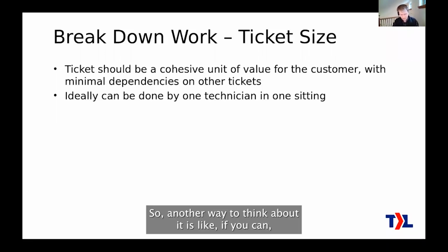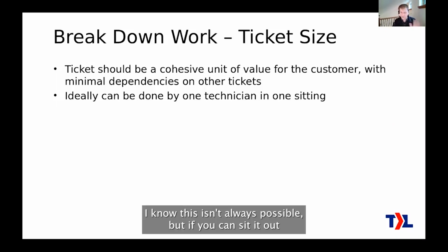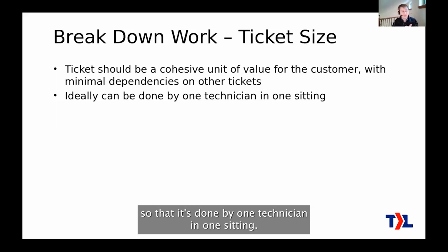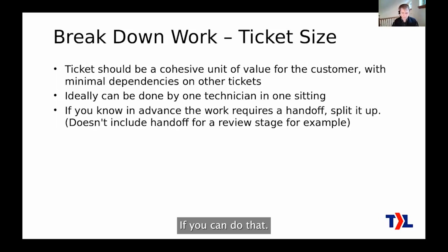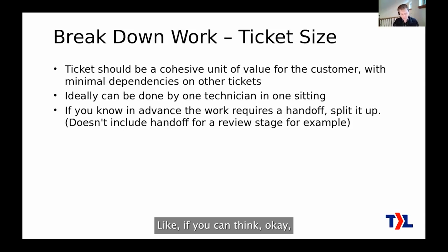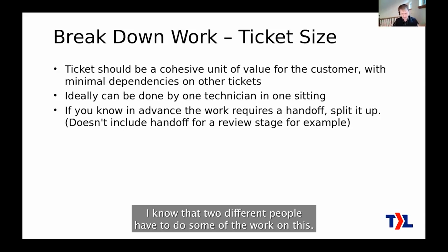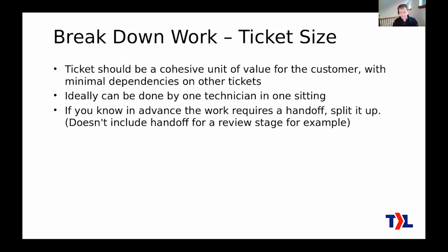So another way to think about it is, it's kind of ideal, I know this isn't always possible, but if you can set it out so that it's done by one technician in one sitting, okay, that's great if you can do that. If you know in advance the work requires a handoff, then split it up. Like if you can think, okay, I know that two different people have to do some of the work on this, think about if you can actually make that two different tickets.